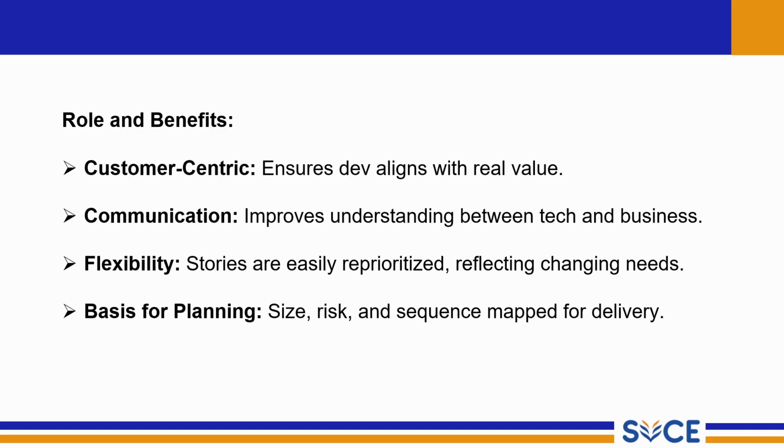Next one is flexibility. In Agile, change is expected. User stories are easy to reprioritize when business needs evolve. A team can quickly add, remove, or reorder the stories in the product backlog based on feedback, market shift, or customer request.